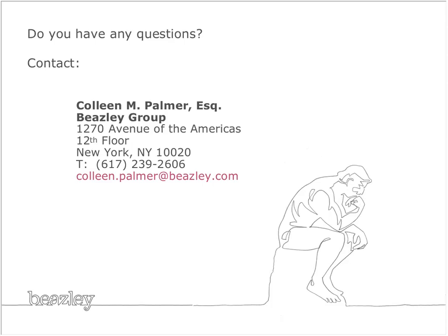Now, with mediation, ultimately, if the parties just cannot agree, then they walk away. They don't have to reach an agreement in mediation, and they can then proceed to, we like litigation as opposed to arbitration. Mediation, though, because if you go with good faith that you really do want to resolve the situation, we found, there's stats out there from various groups, but it's as high as 80%-ish can settle in mediation, or after mediation, a few days later, the parties get back together.